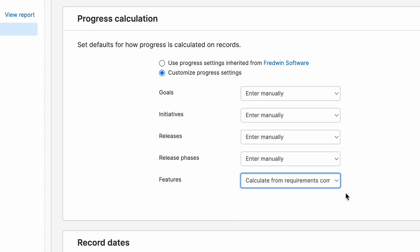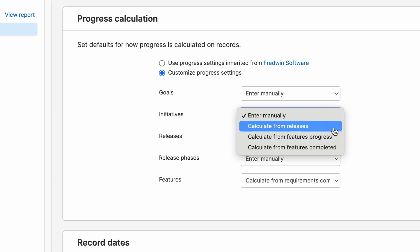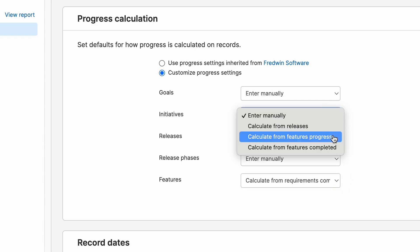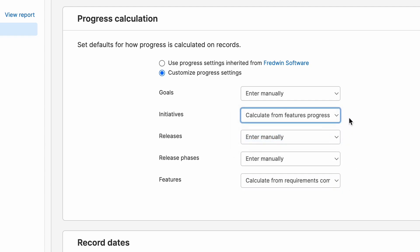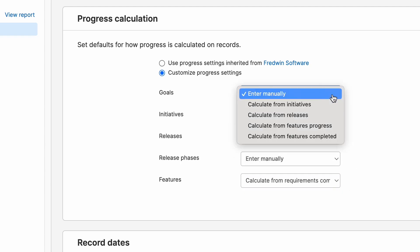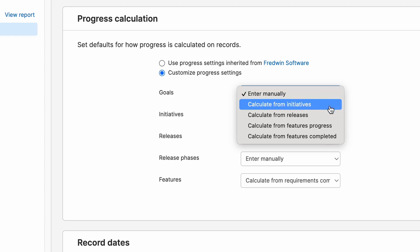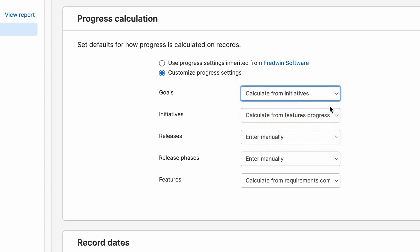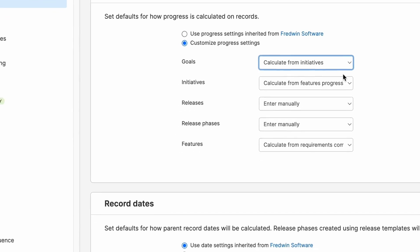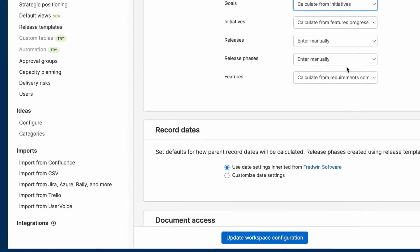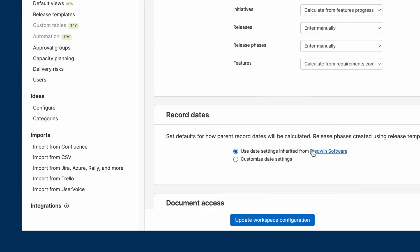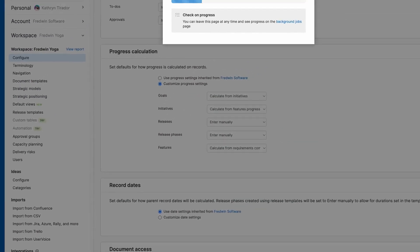The great thing about progress calculations is that you can start to roll up progress to other records all the way up to the company level. So in this case, we could set initiatives to calculate from features progress and then set goals to calculate from initiatives. This provides an automatic roll up so that progress is up to date across your account. Make sure that you update the workspace configuration to save your changes.